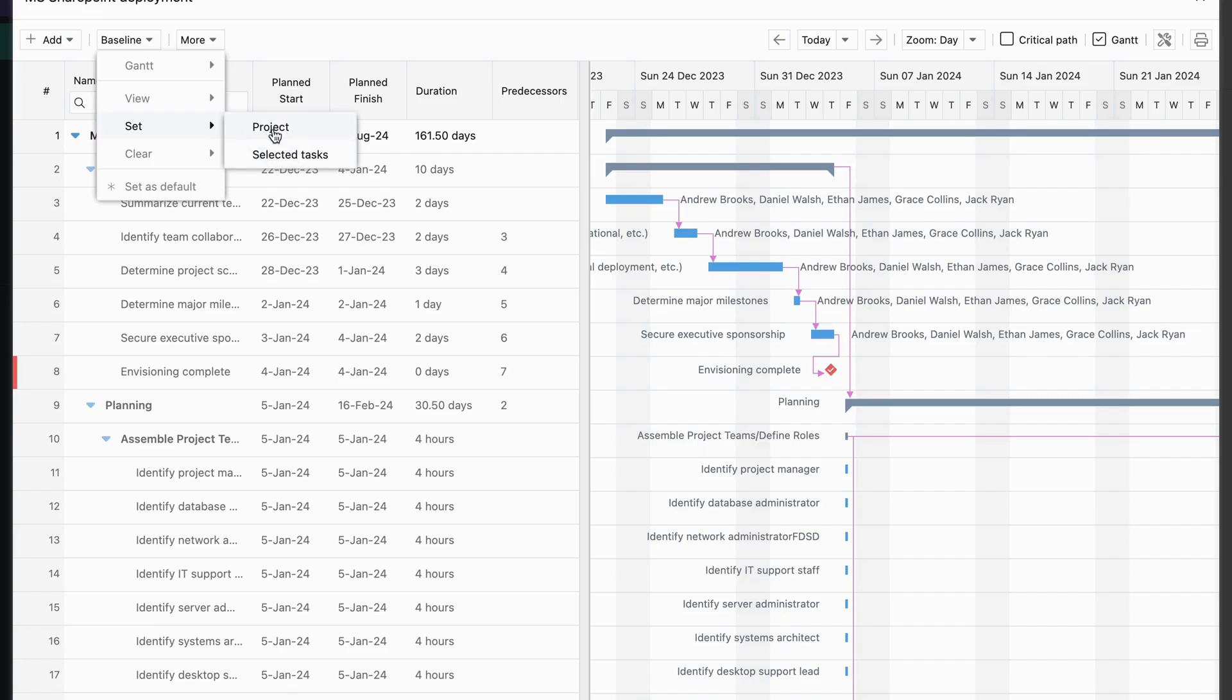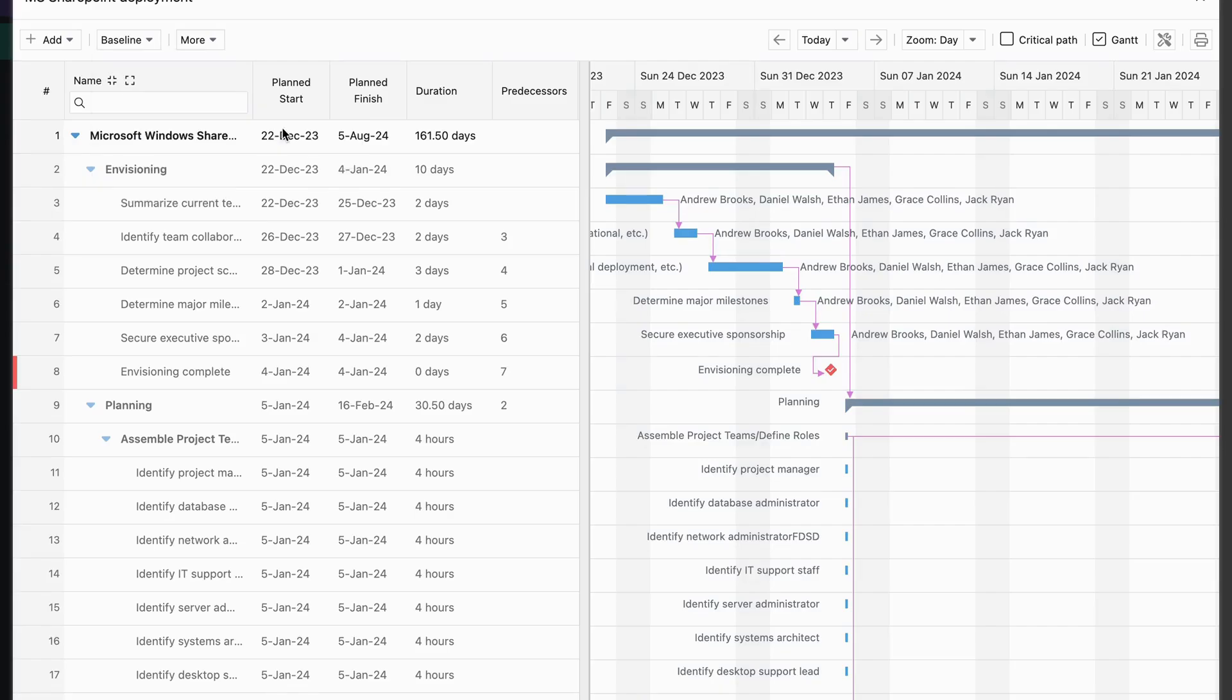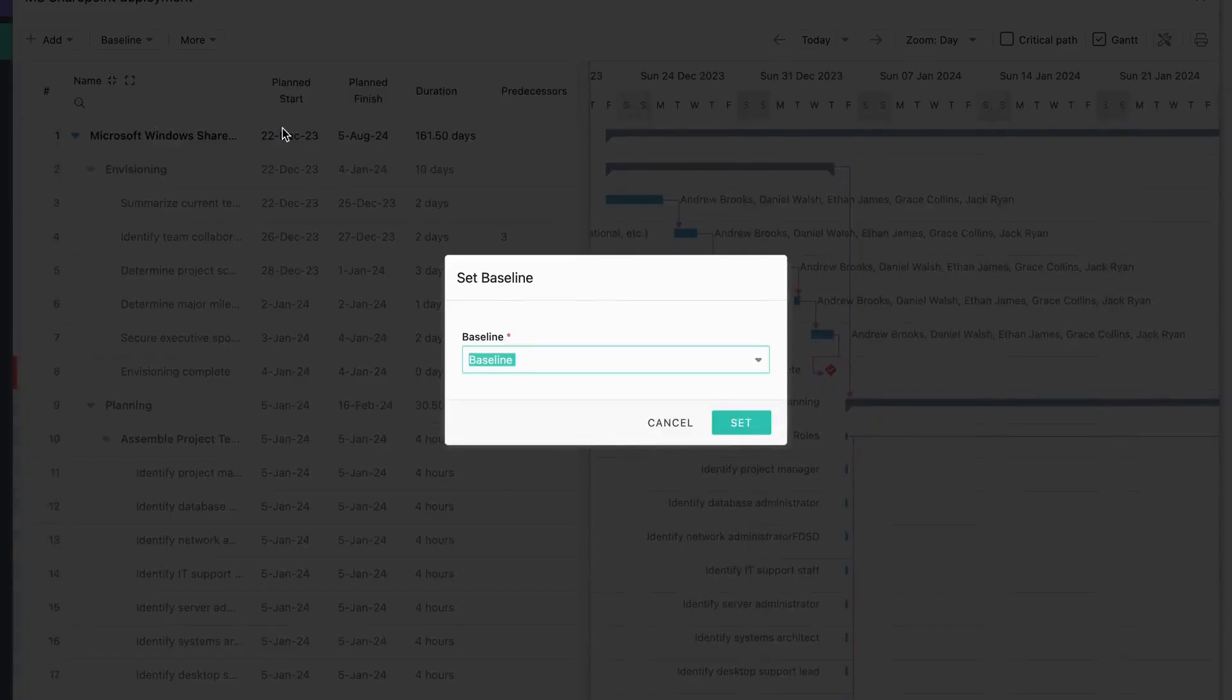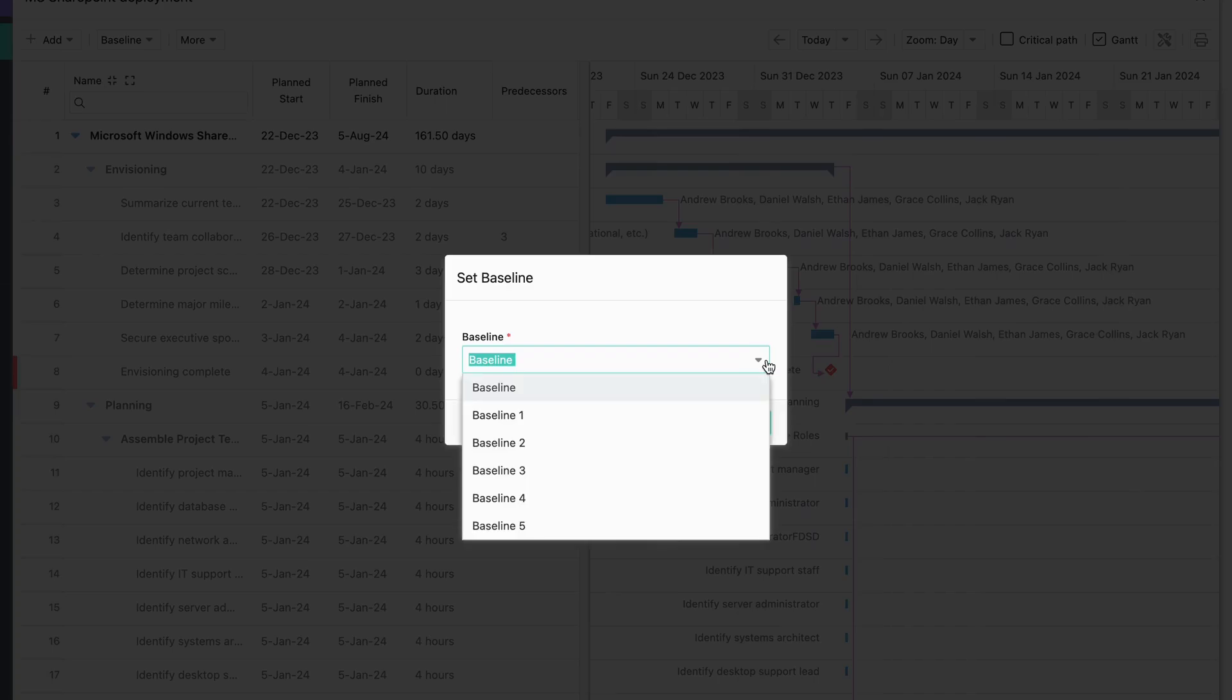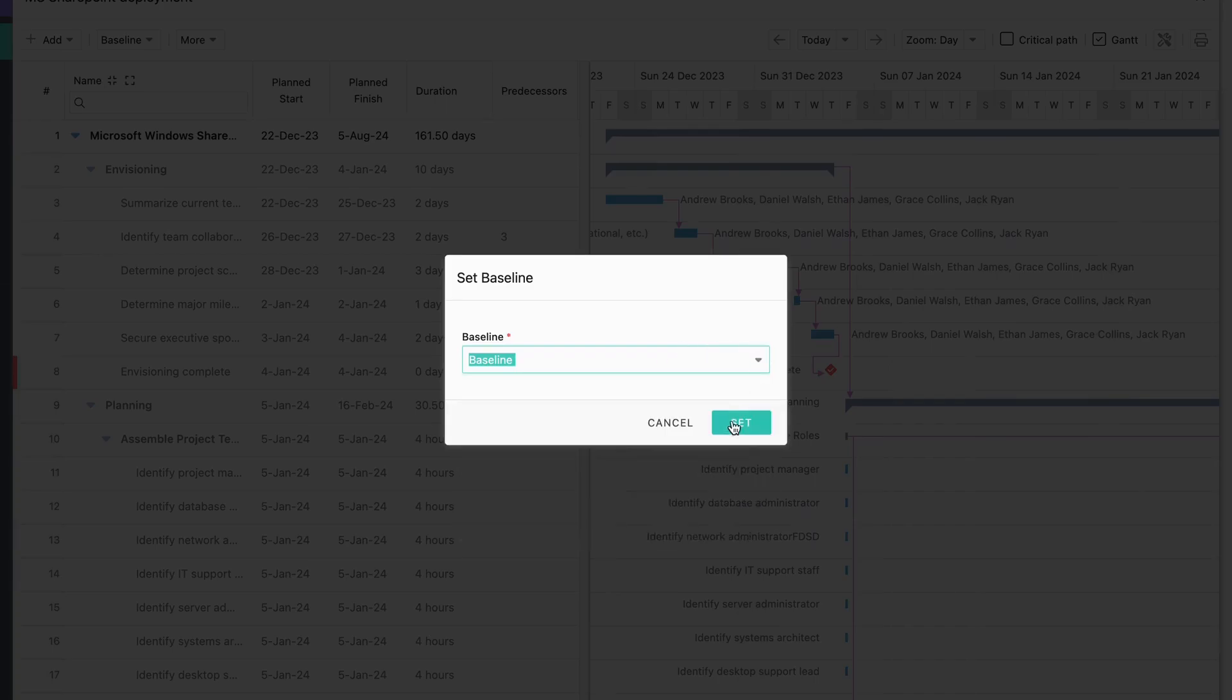For starters, let's set a baseline for our entire project. In Soloxys, you can set up to six baselines per project and compare them. Let's go ahead and set this first one.